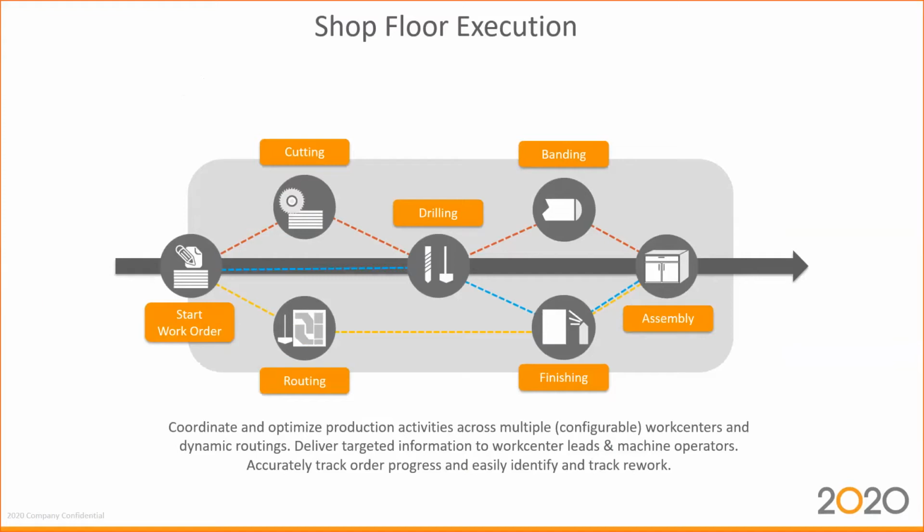Again, one other point here is if I have a bill of material with my raw materials, I get my material cost for estimating purposes. But with the routings, I also get my labor cost, runtime and setup costs. So the material and the labor cost together give you my total cost. Maybe you have some overhead on top of it, but it helps you to estimate jobs prior to releasing them, really in your bidding process.